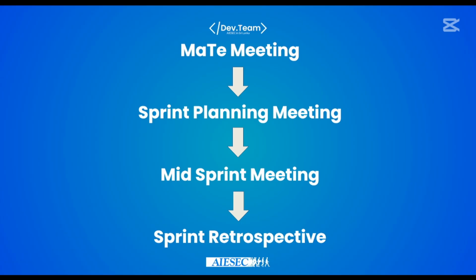It means like this: in a daily stand-up meeting as a developer, I have to discuss three things: what I have done, what I have to do, and what is in my way. It means what I did so far until the last daily stand up, and then what I am going to do next, and is there anything in my way, any blockers for me. Those are the three things normally that we talk about in a daily stand up meeting, but we are not taking daily meetings here because we are not working full time now.